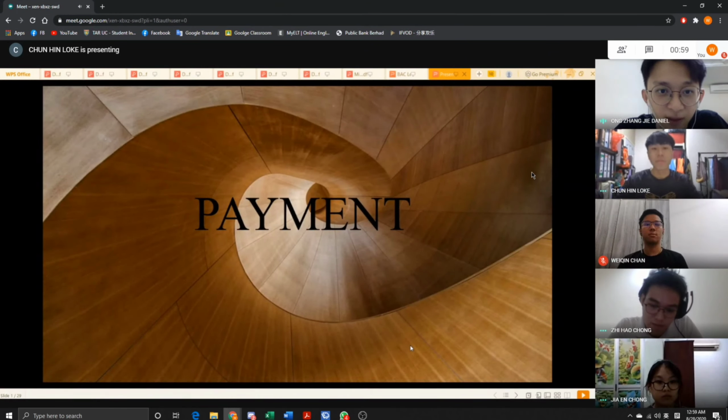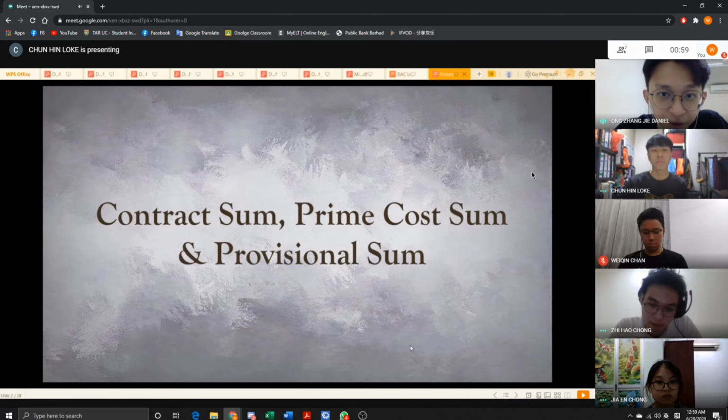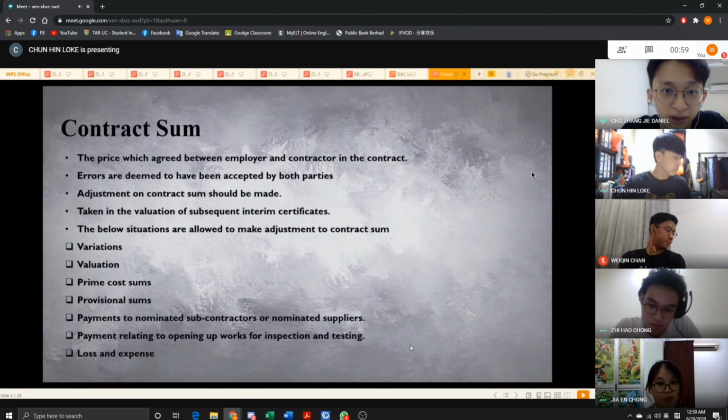Today, I would like to present lecture 4, which is payment issue. I will explain the three types of sum, which is contract sum, prime cost sum, and provisional sum. Firstly, contract sum is the price agreed by the employer and the contractor in the contract.